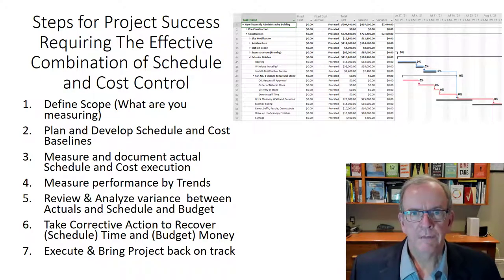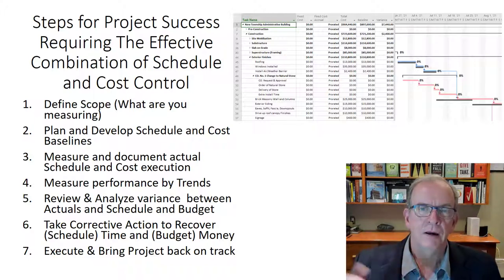So, for example, if we're doing a 30-story condominium building and we're taking 7 days to do each floor instead of 5 days, and of course, if we have the resources that we plan, that would be adding a lot of extra costs. Then how much over budget are we on this one floor? And then if we continue this trend, how much over budget and how much delayed will the project be if we do another 29 floors, if we go at this pace?